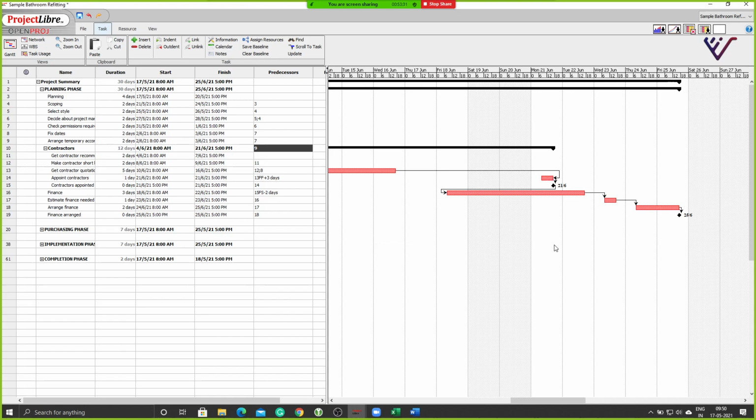Make sense? So this can be a case where I'm getting a painter onboarded. So the plastering guy, after he has finished his plastering, I will not wait for the plastering guy to finish his plastering and then call the painting guy. So if the plastering activity is going to take say another 2 days, I will identify the painter and I'll get him onboarded, so that person can. Yeah, makes sense.